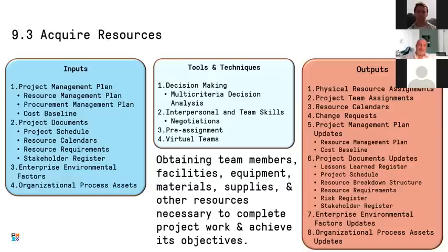The multi-criteria decision analysis really works on understanding the different criteria needed and the different weights. Let's say I want to buy a vehicle, brand A or brand B. I need to know what the criteria are. Is the price most important for me, or is it the availability of spare parts or availability of service? So multi-criteria, and I hope that you have been through this before, but we can see some examples later on in the explanation if you would like.